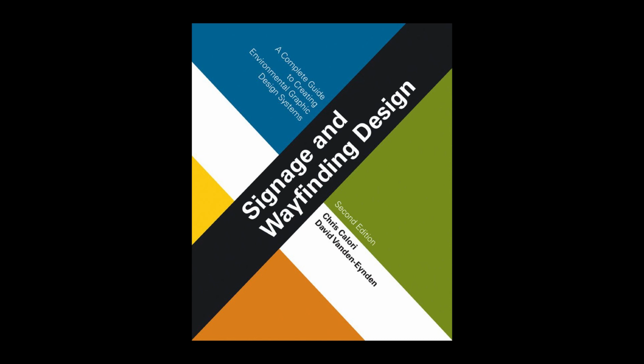This is a mistake for 2 reasons. First, the project design firm can provide valuable technical assistance on signage-specific issues during the bidding phase. Second, many contract reps don't have experience with signage packages. Bid phase items on which the design firm can advise the contract rep include bidder qualification, bid form development, invitation to bid, responses to information requests including the pre-bid meeting, bid review, and contract award recommendation.